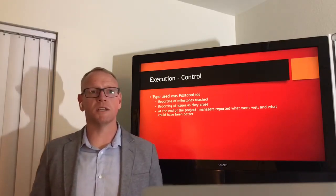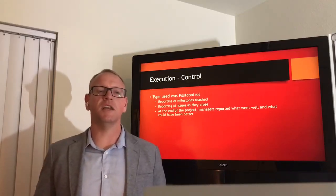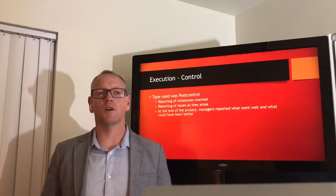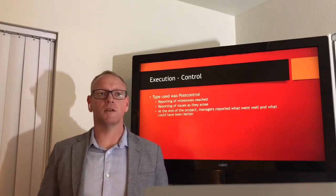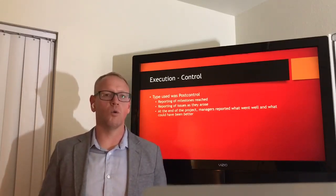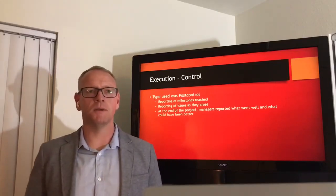The control of this project was actually a post-control, where we reported the milestones reached, and then any issues that came up while the project was underway were to be brought up, and that way they could either be handled and documented as necessary. At the end of the project, I required all of the managers and leads to report to me what went well with the project and what could have gone better. That way we had a better understanding for the next time.